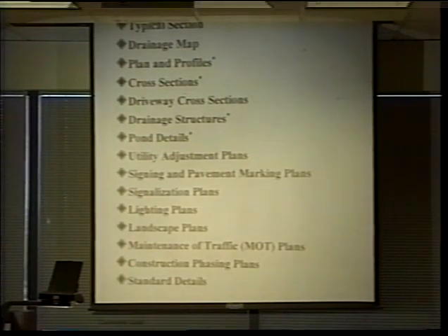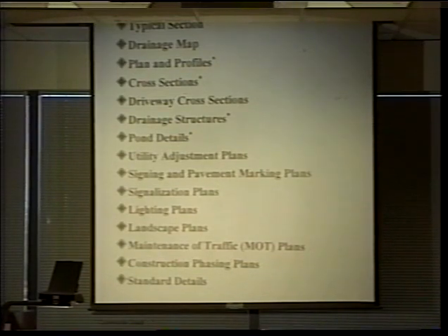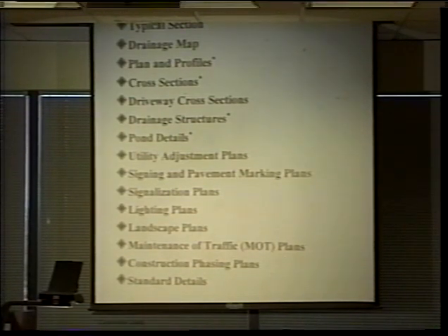we've got maintenance of traffic. On large projects that are existing roadway projects, it's absolutely essential that they be built in phases. A roadway system must be maintained in operation, and so a phasing or a sequence of construction is included in the project, and that simply shows the sequence of roadway or lane closures.